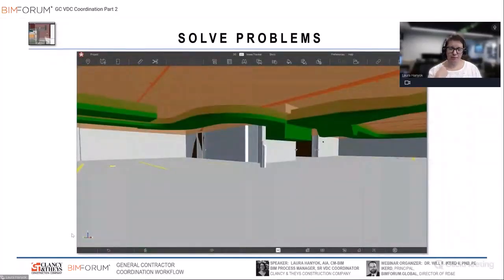This is actually in that same project where we were looking at the parking garage. So I'd included this image last time where, as part of our supplemental modeling, we're actually modeling in a clearance for the garage. We might do the same in a retail space. It's what you see in that transparent orange color here. What's green is exhaust duct. And as you can see, that was dipping way below that clearance. So we had to work with our team to figure out how we were going to make this garage work.